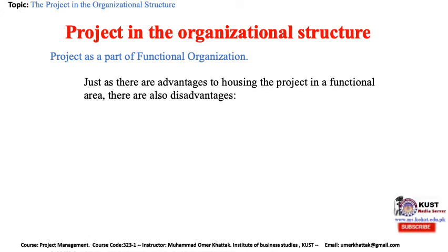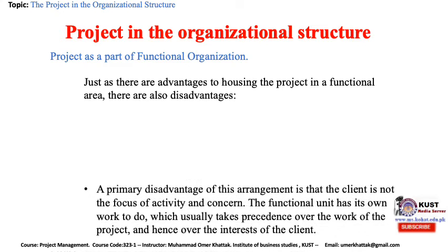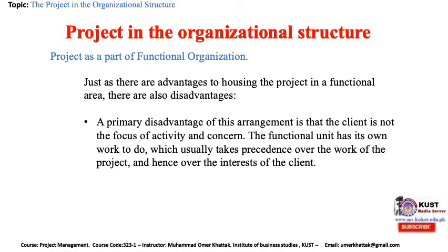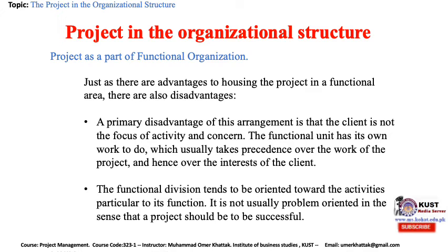Just as there are advantages to housing the project in a functional area, there are also disadvantages. A primary disadvantage of this arrangement is that the client is not the focus of the activity in concern. The functional unit has its own work to do, which usually takes precedence over the work of the project, and hence over the interest of the clients. The functional division tends to be oriented towards the activities particular to its function. It is not usually problem oriented in the sense that a project should be successful.